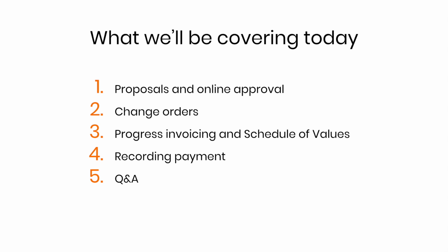We will also move into change orders so that once that job is signed or made active, if we need to make any changes to the value of the contract, Knowify has a fully fledged change order system that we can also use to send out documents for approval and keep track of the additions, or even if there's a discount, the subtractions to that original contract price. The idea is, whenever we send out a bid, we are able to get the customer to sign. And if the bid is ever going to change the price one way or the other, we can also send out a change order for signature as well. So we have signed copies of everything as far as what the customer or GC is due to pay us.